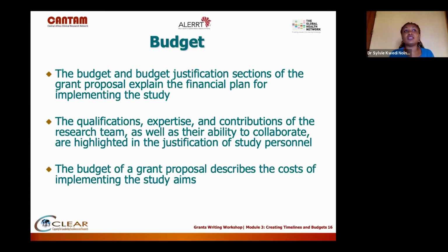But in my projects, I actually set up a form for those expenses for which I cannot obtain receipts. So I fill out the form, for example, for a taxi: I put my name, the date, the time, that I took a taxi from this place to this place, and it cost this much.